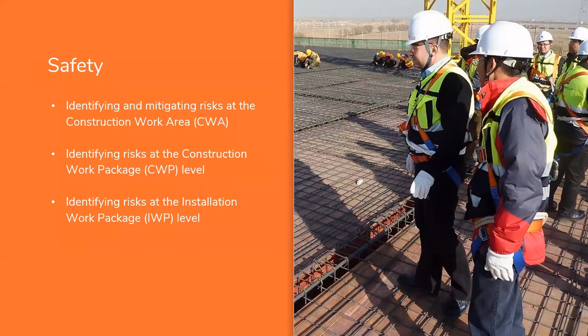And so some of the risks that might exist in one discipline may not exist in another. So for example, if we're looking at electrical packages, there may be issues around lockout tagout procedures that are really critical and will heavily impact safety. Other disciplines may have other specific risks associated with them. They need to be very familiar with what those risks are.